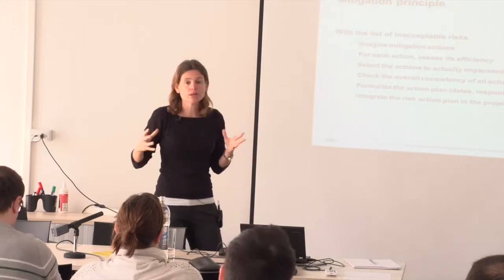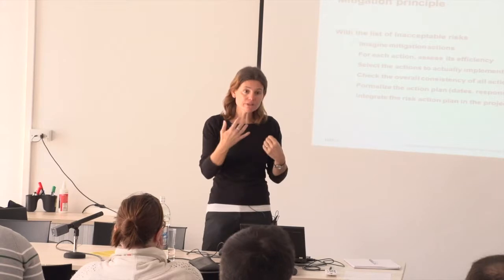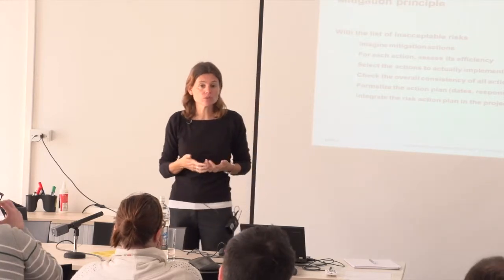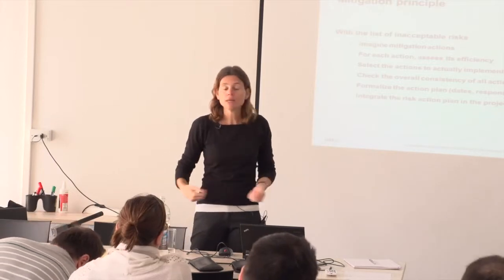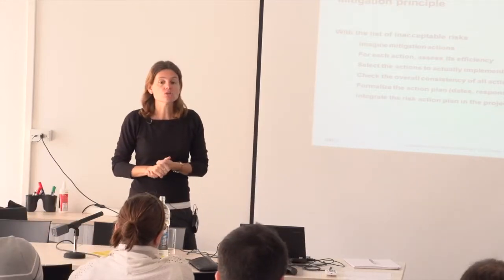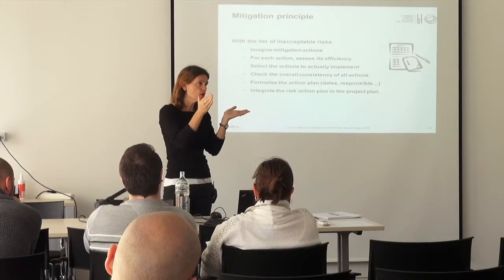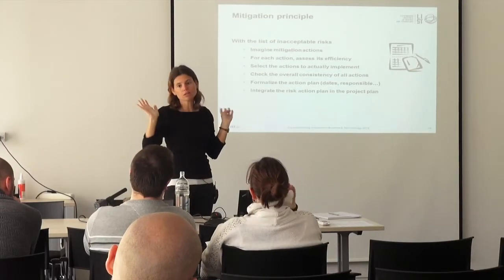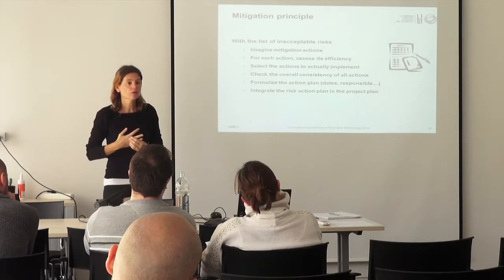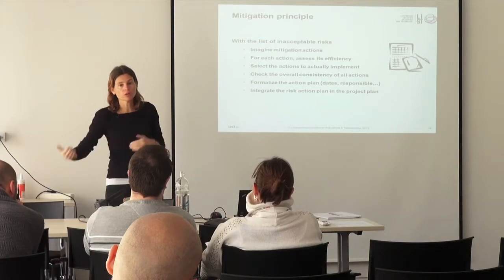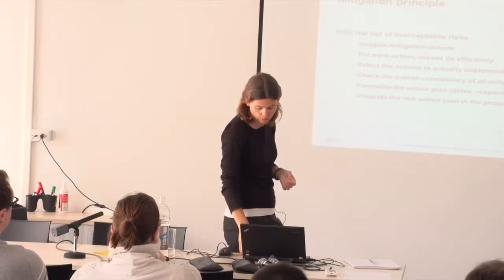And so, of course, risk management is part of project management. So all these activities that you want to do about risk management have to go somewhere into your project plan, into your project budget, and so on. So you need to think about risk management, focusing on it and forgetting the rest for a moment, but then integrate whatever you have decided for risk management back into your project planning, into everything on a project.